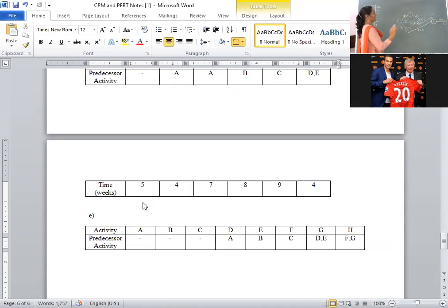Again, you have to compute the forward pass and backward pass. You know how to compute. The start node is 1. E1 is always equal to 0 according to the procedure. Earlier start is always equal to 0. Then how will you compute E2? E1 plus T12. E1 value is 0, T12 value is 4 days. E2 value is 4.